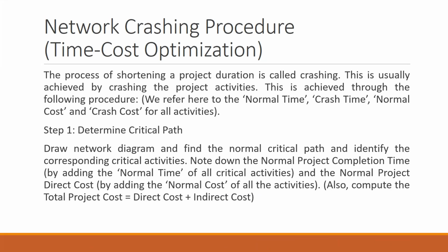Or if the network diagram is not very complex, you can list all the paths available in the network diagram and find the duration. Your critical path is the path which takes the maximum duration to complete, and all the activities on the critical path cannot be delayed at all.